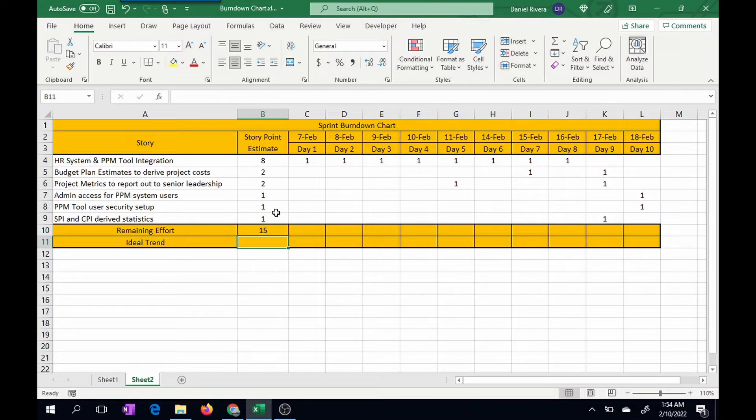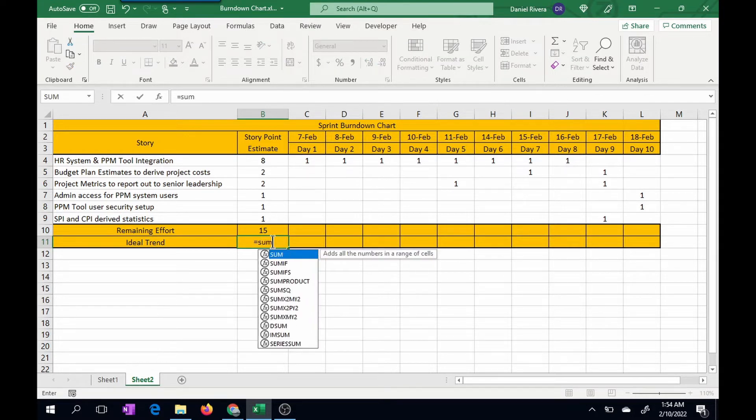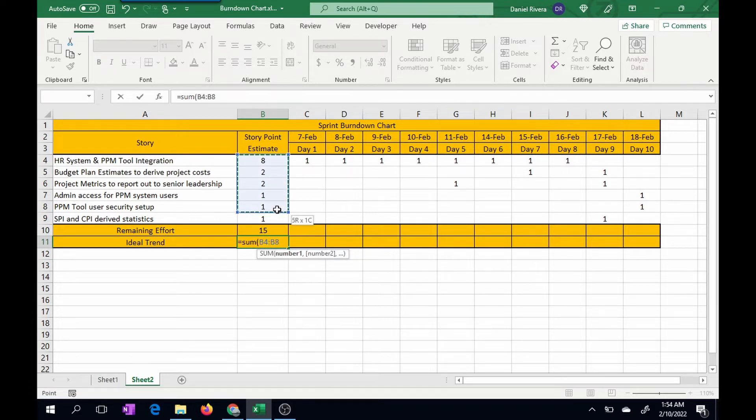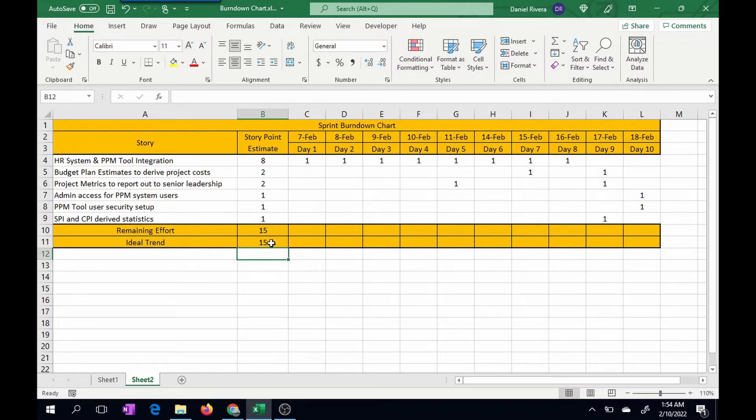And I'm going to do the same for this particular cell here. It's going to be the same number because we're just starting out the sprint, so the trend and the remaining effort should be the same.